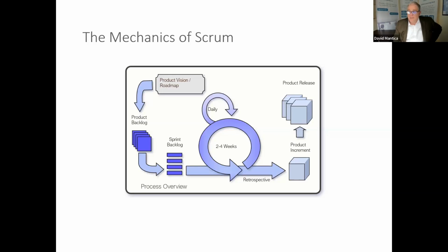What are some of the things that you're going to be working on in upcoming sprints? You're going to pull those in. Then you're going to create your sprint based on a number of user stories from that backlog. That sprint's going to be timed. We're going to do this in 4 weeks. We're going to meet daily to review where we're at within that scope that we boxed into 4 weeks. We're going to finish with an increment that someone can look at, touch, feel. They may come back with new emergent requirements that we're going to add to either the sprint backlog or the product backlog. Then we're going to reevaluate for the next iteration plan based on where we see we're at.